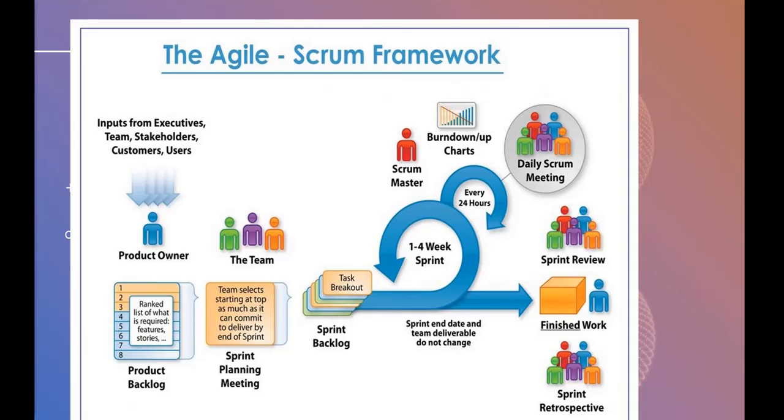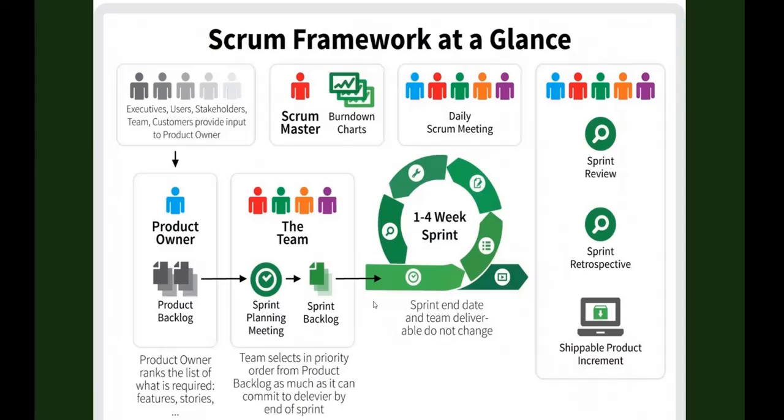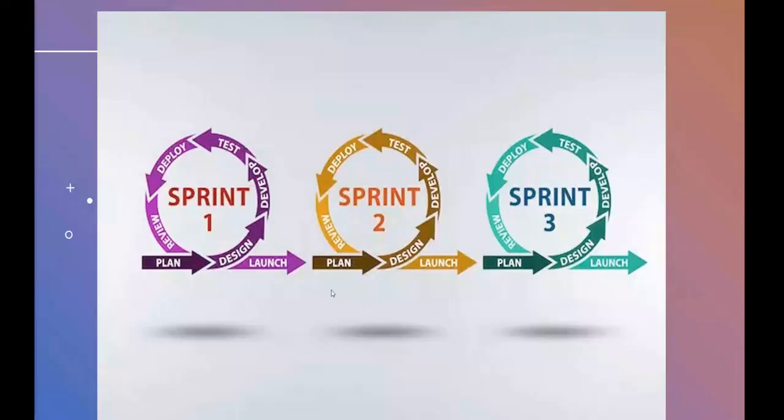For example, if you run a sprint of 2 weeks, the other sprints should be 2 weeks in duration. It cannot be, for example, that this is 1 month, the other will be 2 weeks, other will be 3 weeks. It cannot be like that. It should be a fixed duration for each sprint. If you said 2 weeks, every sprint should be 2 weeks, right?